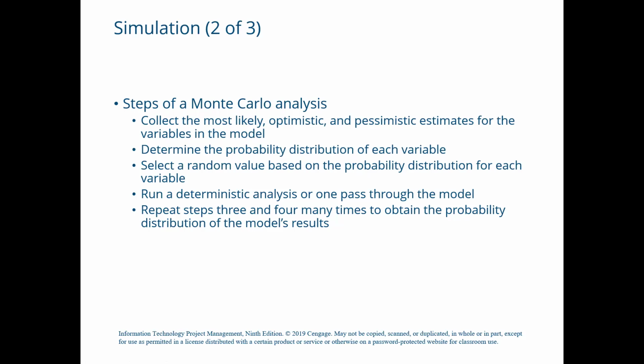For example, if an expert assigned to a particular task provides a most likely estimate of 10 weeks, let's say, an optimistic estimate of 8 weeks, and a pessimistic estimate, let's say, of 15 weeks. You can then ask about the probability of completing that task between 8 and 10 weeks. Again, the expert might respond that there is a 20% probability.